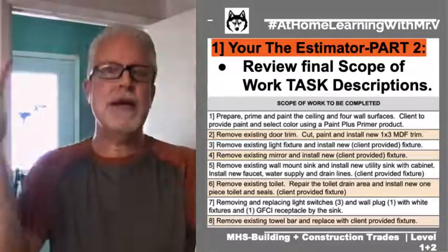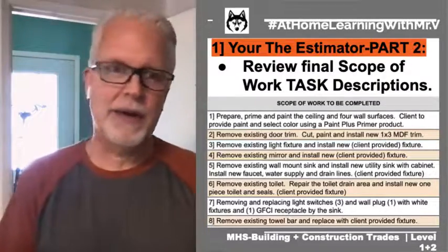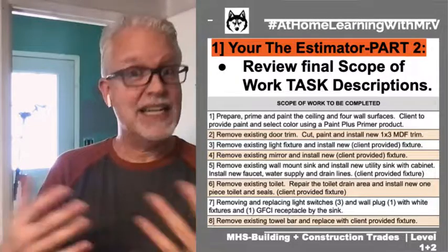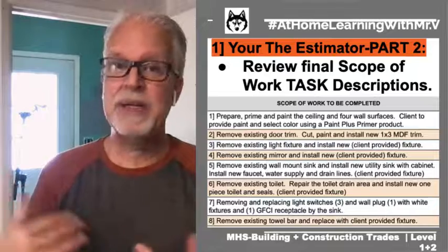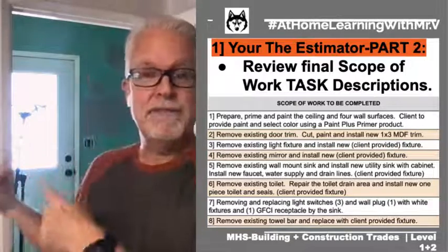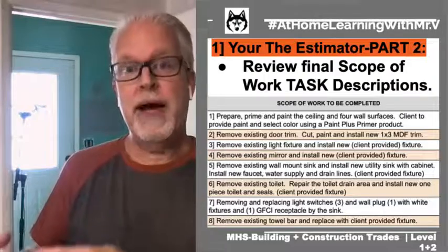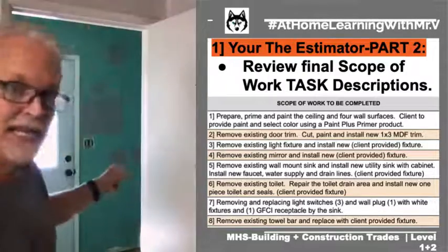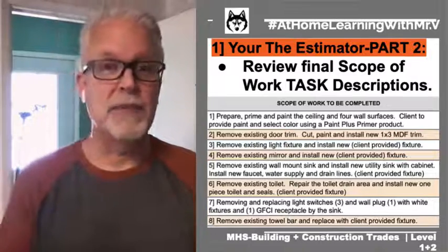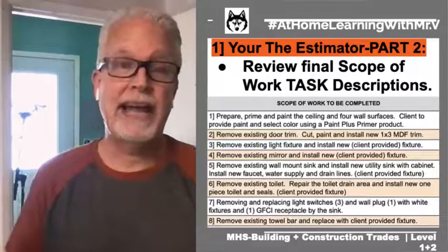I've had it where I've bought stuff and the client has bought stuff. I'm like, no, now I got to return it and get a credit back, or what they bought doesn't fit or work technically with what we're doing. I've had that happen. And so, for example, with plumbing, you could buy the fixture and the drain lines, but the drain line that's actually in this bathroom may be smaller or larger than the pipes and the fittings that you bought. No bueno. I can't finish the job.